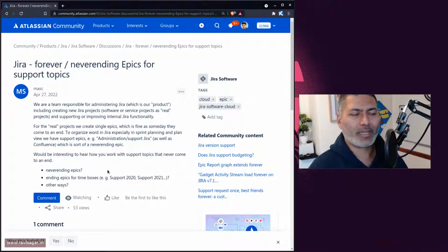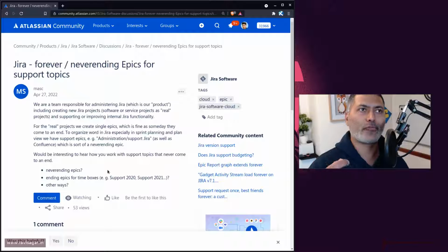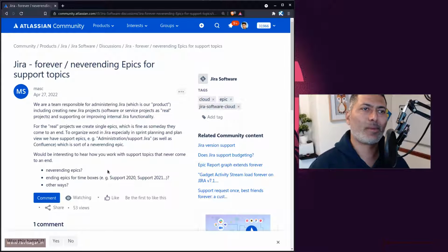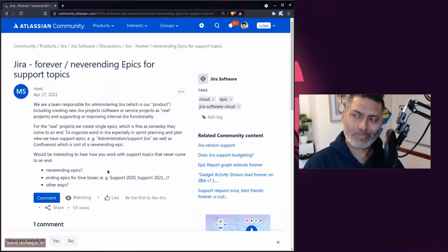I'm talking about quarter, again, I'm trying to follow SAFe. It's not really just SAFe, but usually when people make a plan, they try to make a plan for at least 2 months or 3 months. So again, quarter is nothing but your time boxed approach. So you can definitely create one epic in your program increment or your quarter.